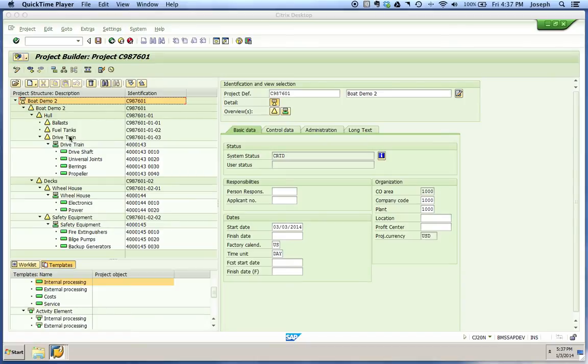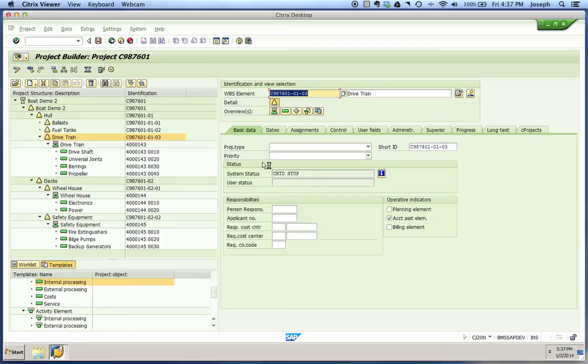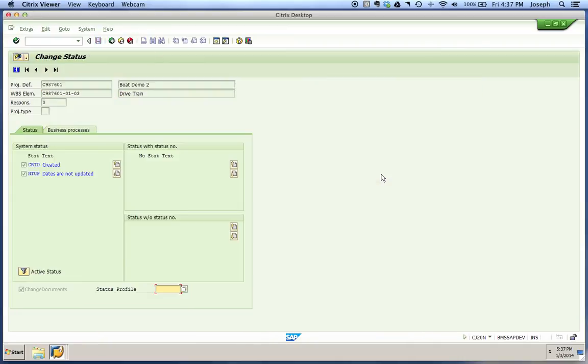Go down to the drivetrain, which is our first WBS element with a network header below it, and you'll see it says created in NTUP. NTUP means dates are not updated.